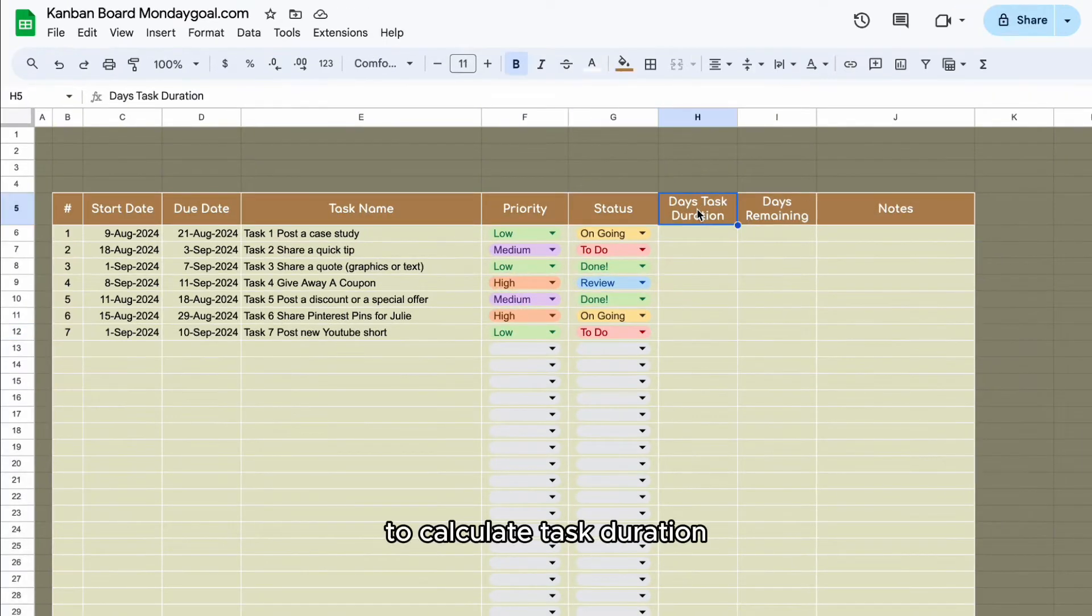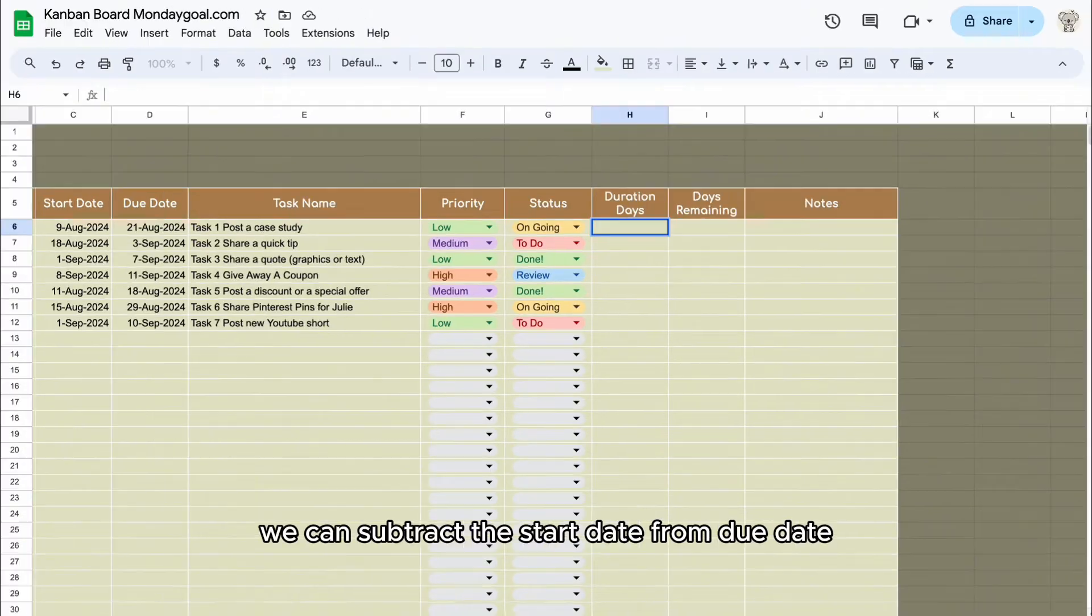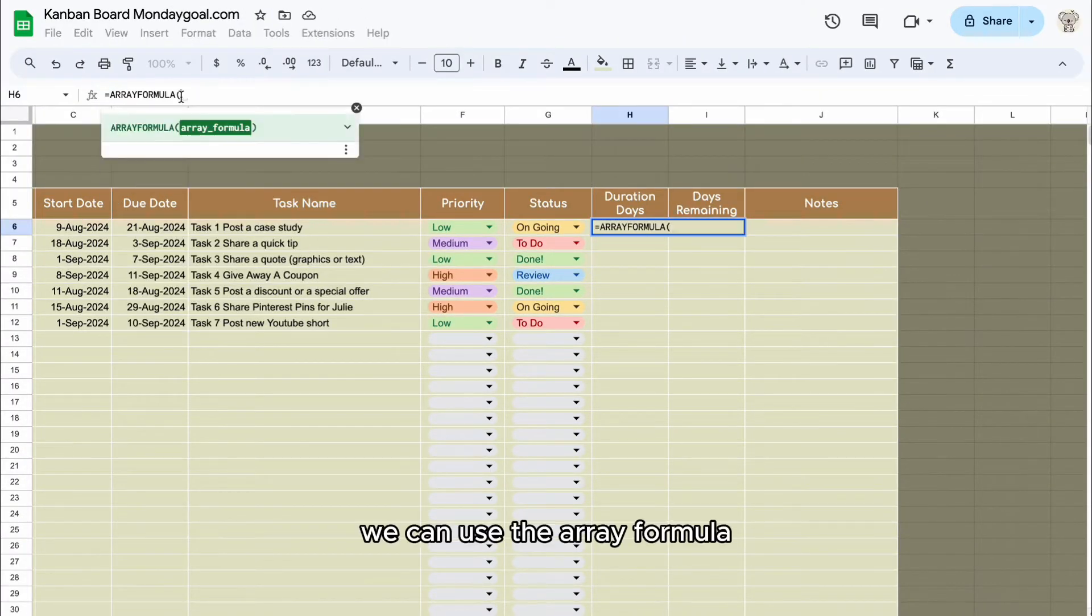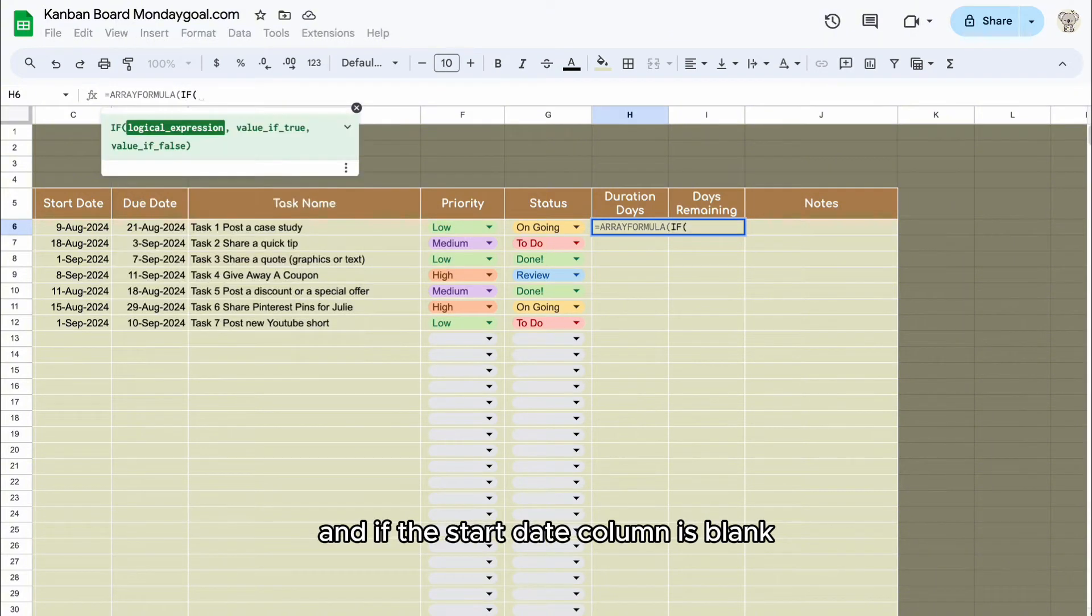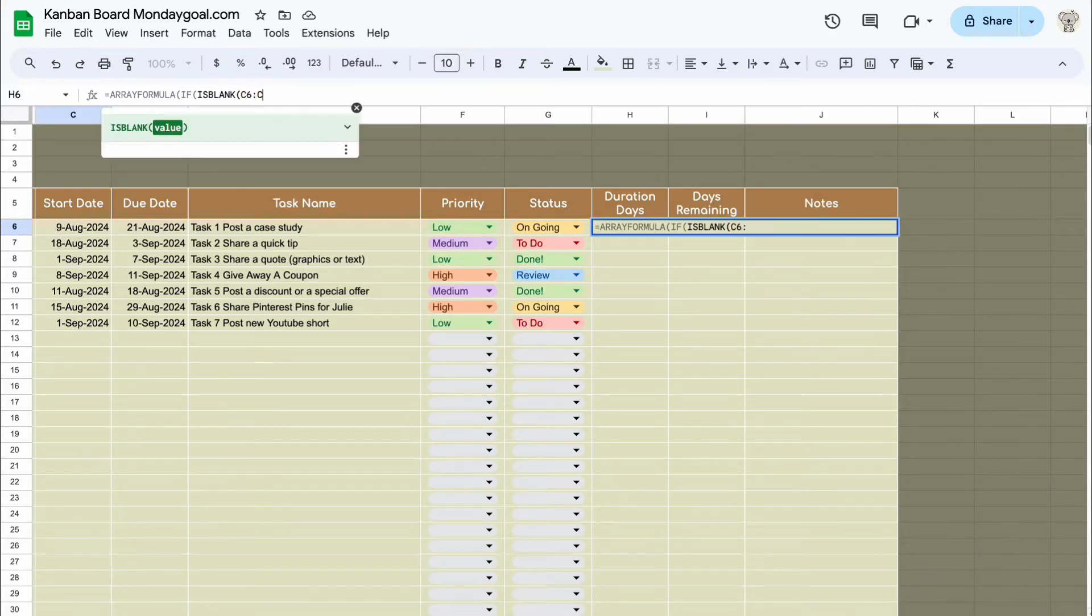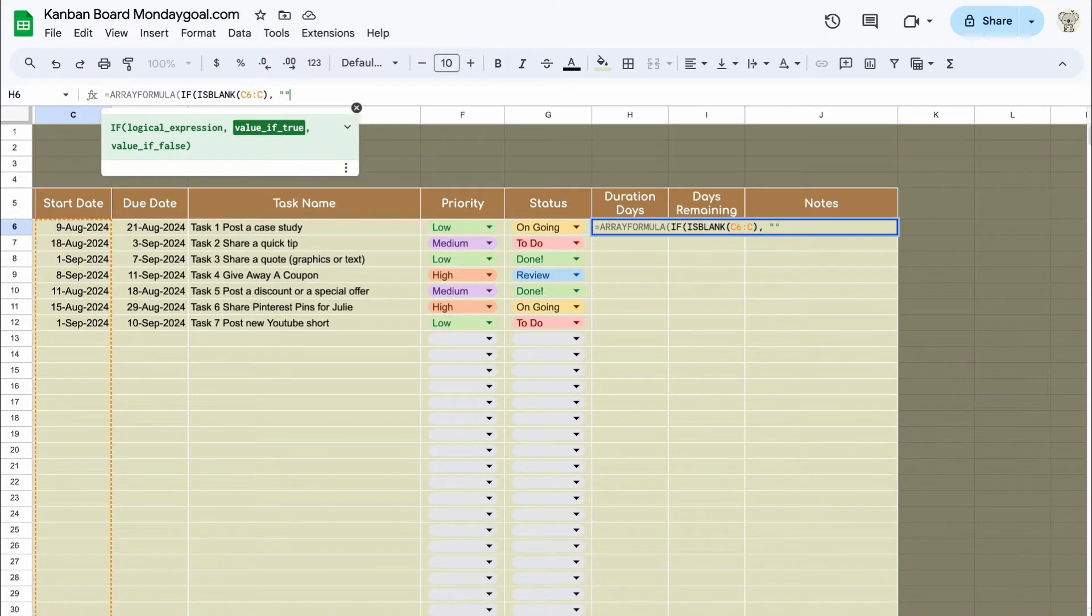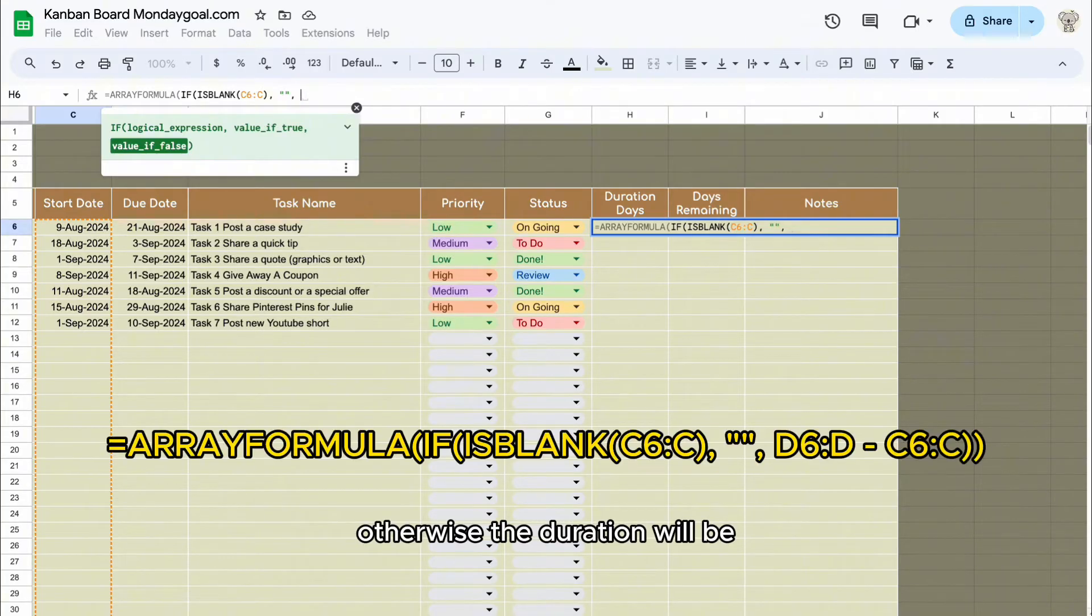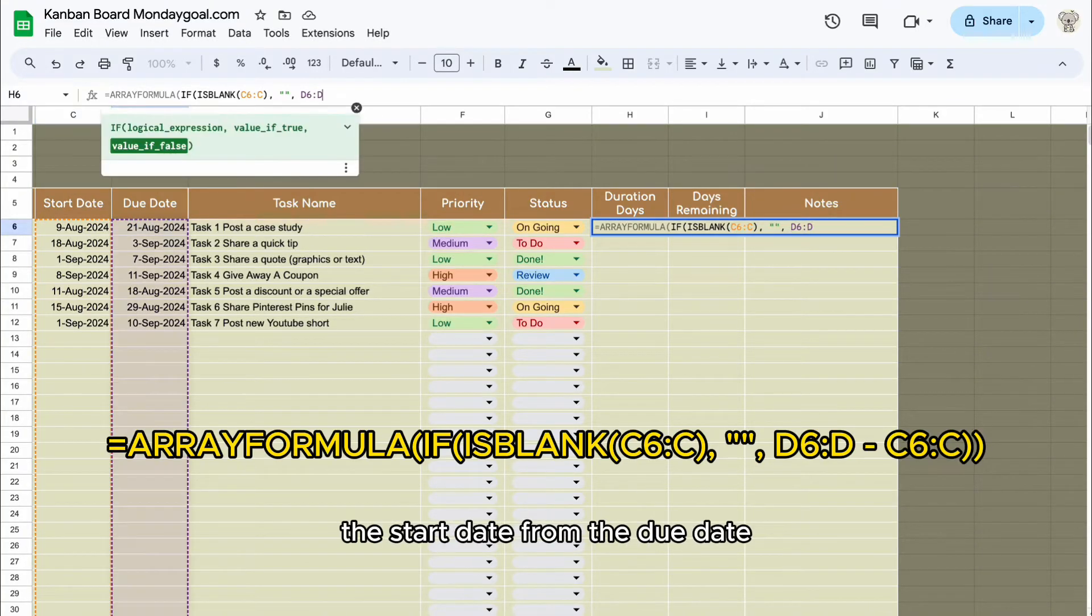To calculate task duration, we can subtract the start date from due date. We can use the array formula and if the start date column is blank, the result will be empty. Otherwise, the duration will be the result of subtracting the start date from the due date.